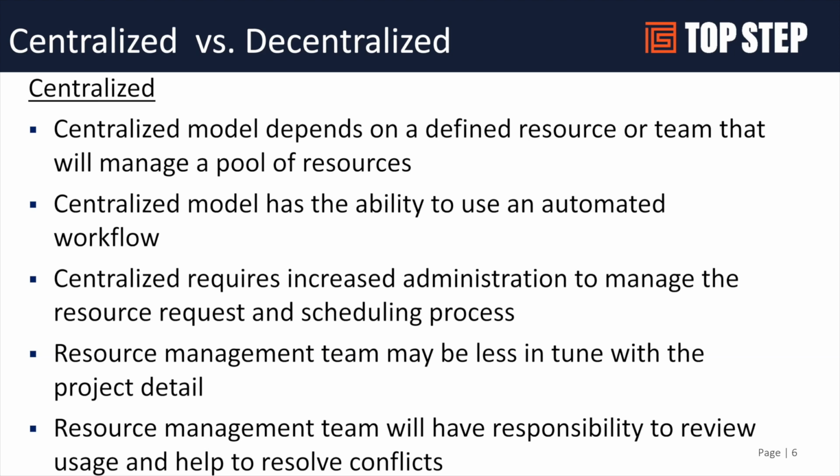They're more concerned with what the resource requirements are for the future of the projects. And they are also responsible for managing usage. So they're responsible for making sure we're not overstaffed or understaffed, as well as where there are conflicts that will occur. Their team is managing those conflicts.